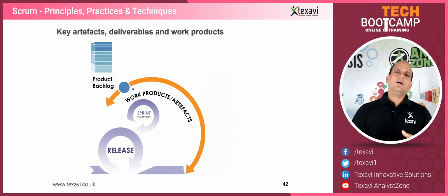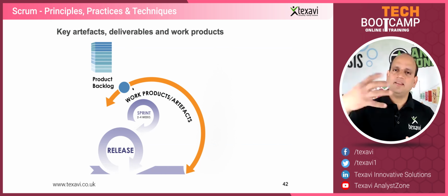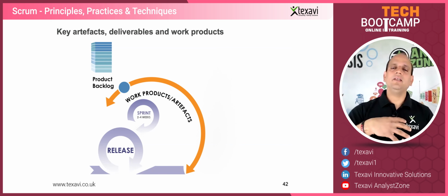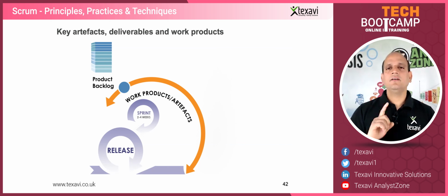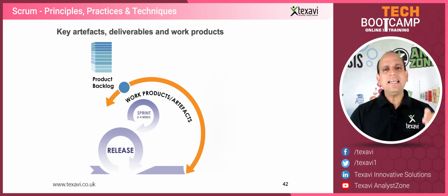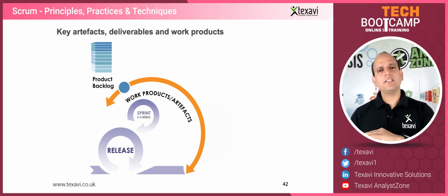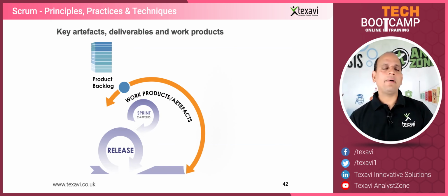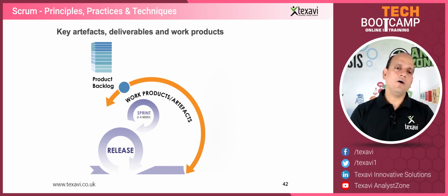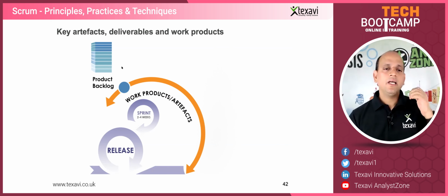Once the product is launched and delivered, whatever has been given by the customer, the feedback, the changes, defects, any new tasks, technical tasks, all of them go into the backlog day in and day out. It's not a one-time activity. It's a continuous activity. So the product backlog gets refined, groomed, prioritized, reshuffled up and down by the product owner every day, every hour. So there is no such thing as this is frozen, let's not work on it.